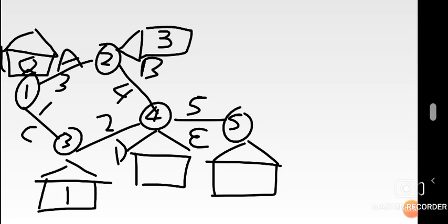Another way you'd ask yourself is, at node 4, is there only one route going to node 4? No, there are 2 routes. So you test out both and then you see which one will give you the highest. So check these routes. On 3 there was a 1 plus that 2 gives you 3, right? What about the route from 2 to 4? On 2 there was a 3 initially as that earliest start time, meaning going to 4 there is an activity of 4 along the route. So it's going to be 3 plus 4 giving you 7 as the longest one between the two.